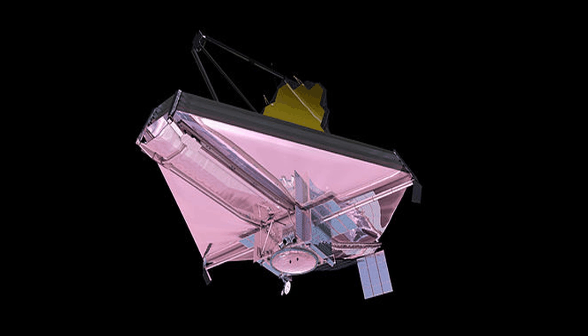The project schedule underwent review during the months following the MCDR, in a process called the Independent Comprehensive Review Panel, which led to a replan of the mission aiming for a 2015 launch, but as late as 2018. By 2010, cost overruns were impacting other projects, though JWST itself remained on schedule. By 2011, the JWST project was in the final design and fabrication phase.